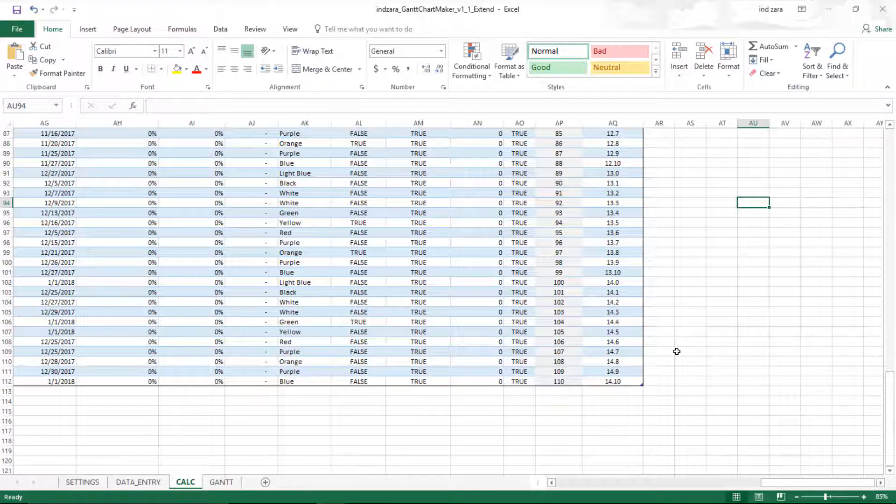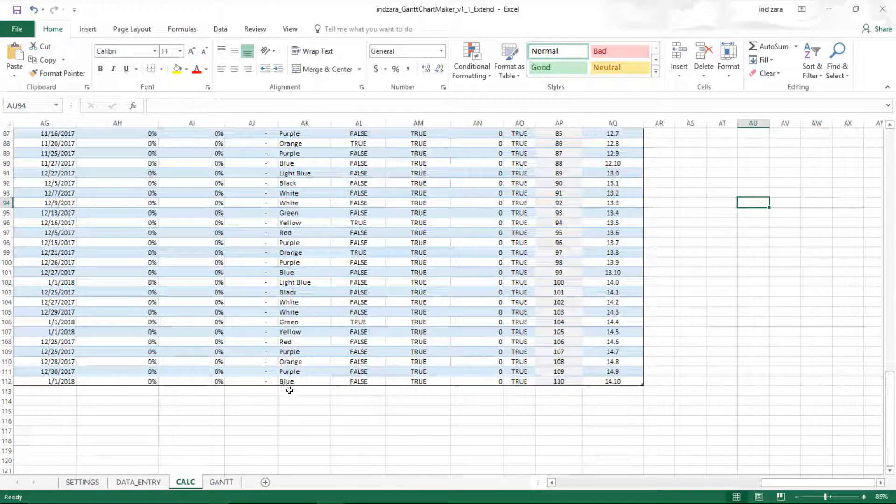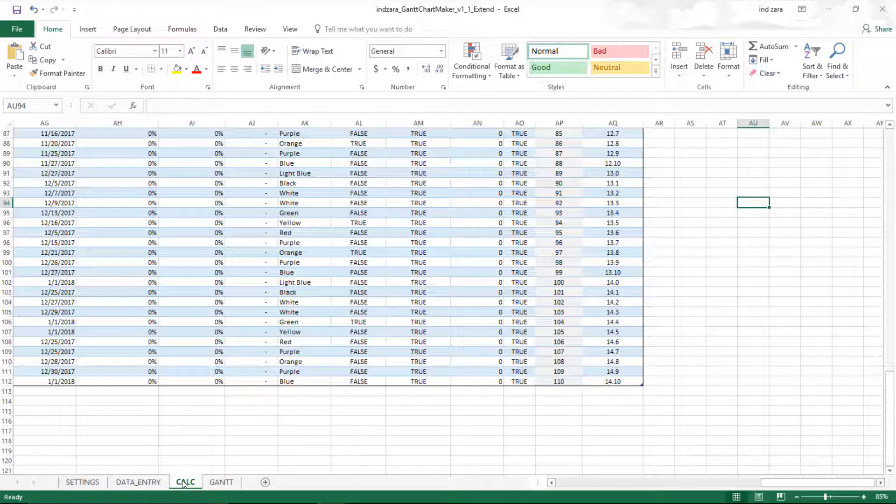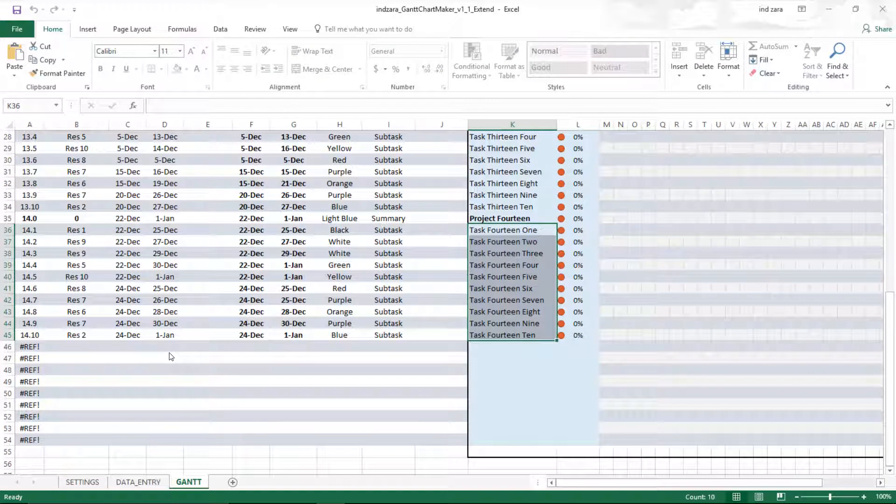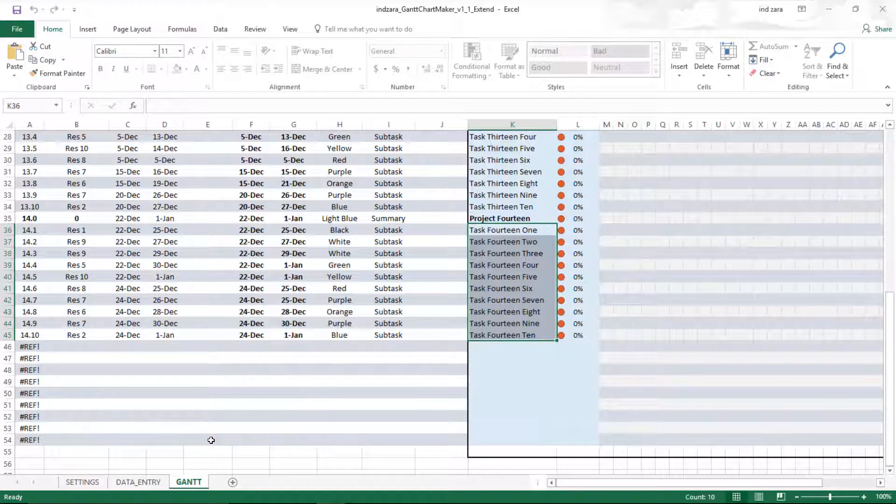So if you need 120 tasks, just create it for 120. Don't use 300 on the table because then it's going to get slower. It'll still work, but it might take longer to process. So that's how easy it is to extend to more than 100 tasks for processing. Now I'm going to right-click again and hide the sheet because we don't want it to be always open—sometimes you may edit those inadvertently and break the formulas. Always keep it hidden after you've made the extension.